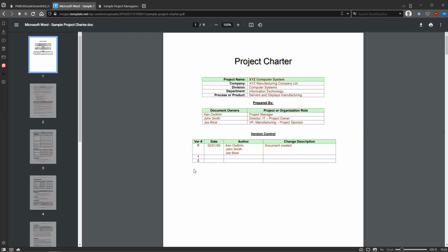And that would go into the project charter and stakeholder management plan as a list of project sponsors. There could be a number of people listed as sponsors. In that case, it's necessary to have a way to reach agreement between these sponsors when making decisions on the project. And the executive sponsor is usually somebody who is asking the sponsor to execute a certain change.